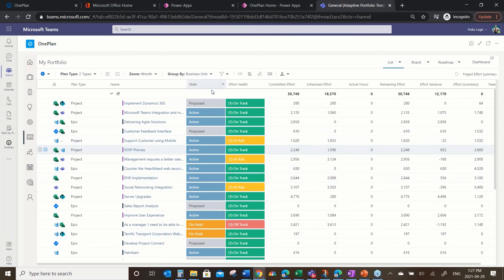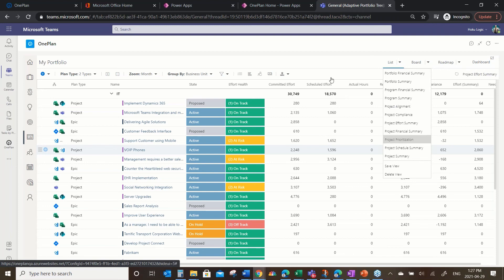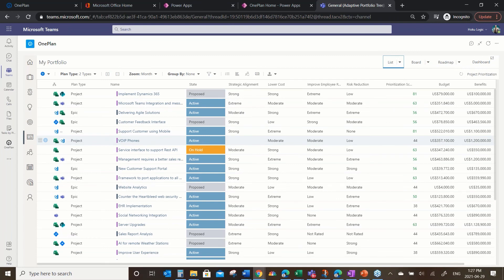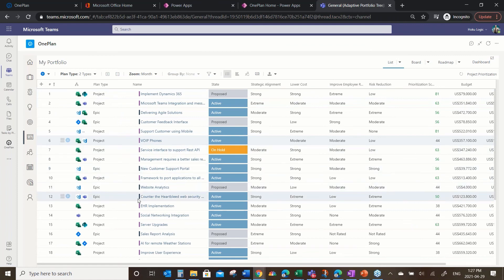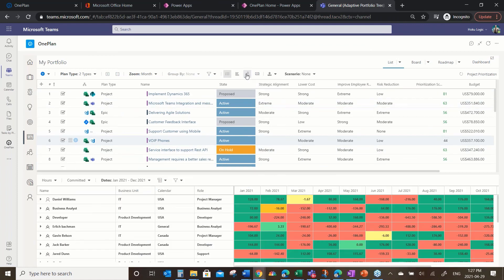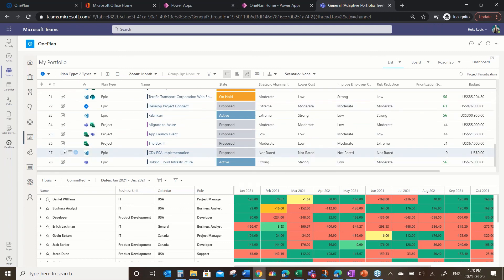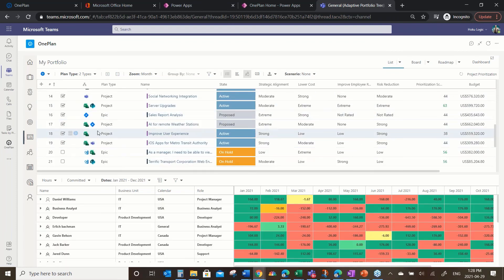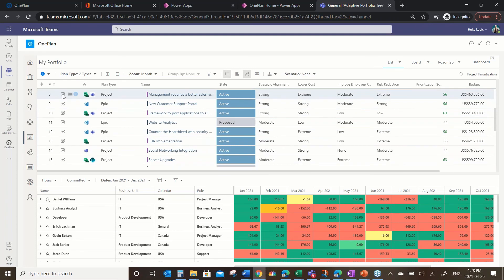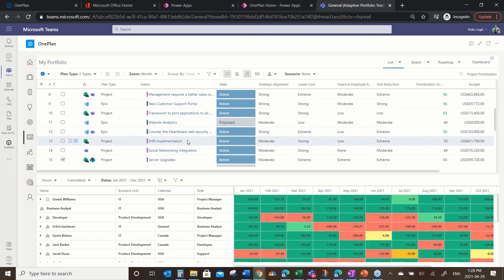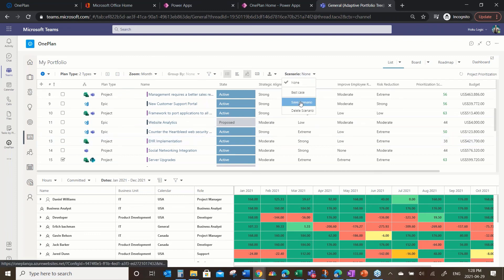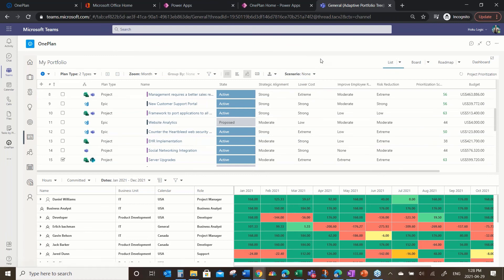Jumping back out to the portfolio, we have that effort view. Jim talked about prioritization, so I'm going to look at this. Having captured the demand or commitment on each and every project, I can quickly pull up a view. I have the ability to drag and drop projects. I want to look at this through the lens of resources. Right now, every project is considered to be in play — we're in a sandbox doing a what-if. I could quickly start knocking some projects at the bottom out, and you'll notice down below that the resource plan is starting to recalculate. If I get more surgical with my cuts and start taking out some middle-of-the-pack projects, suddenly the resource plan starts to look a lot better. And I could go and save that scenario — this is the end-of-April model.